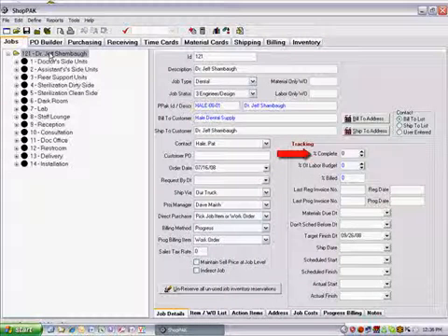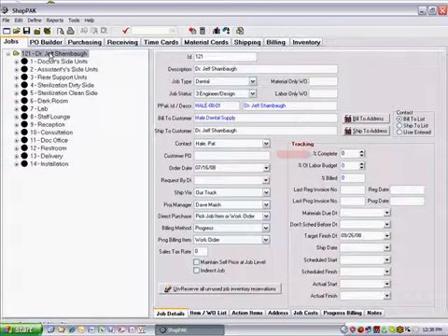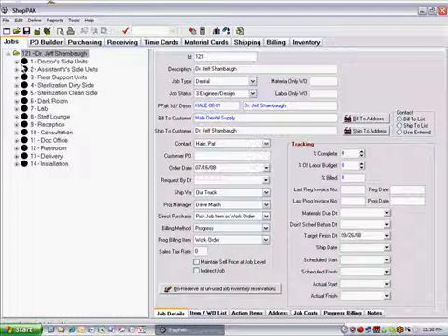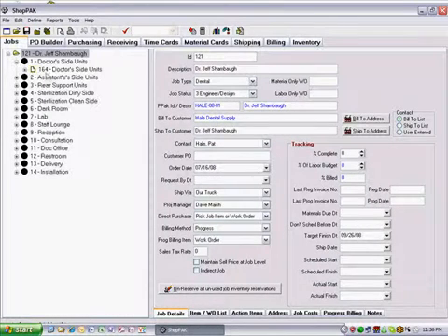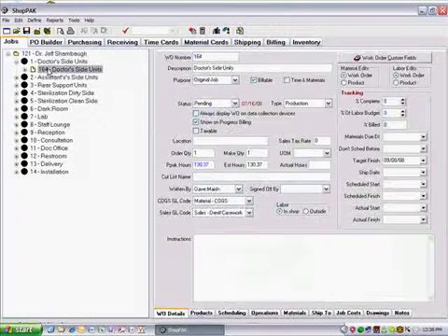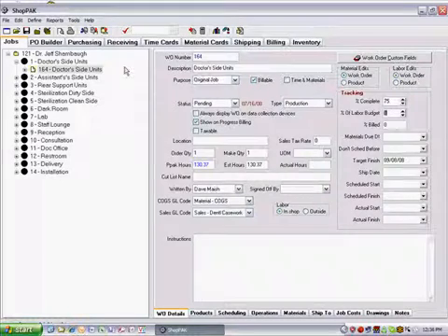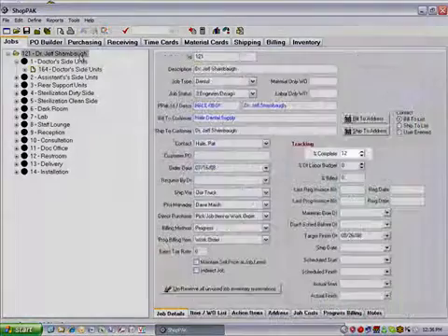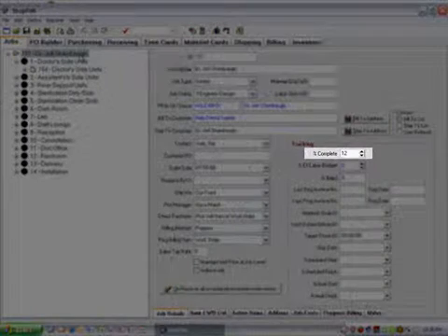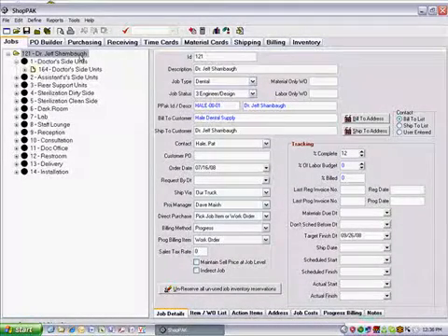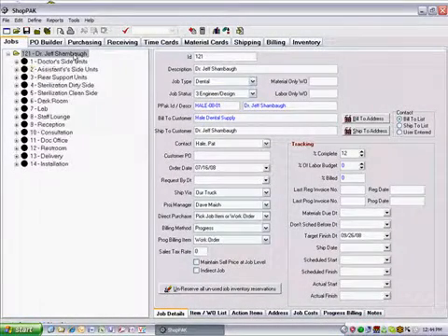You can update % complete at the job level. However, it is usually more accurate to maintain % complete at a lower level in the job tree, let's say at the job item or work order level. And provided you've set up % complete maintenance at the same level, ShopPAK bubbles up the lower level's % complete and calculates % complete at the job level. For more information on all fields and controls, please refer to Chapter 6 of the ShopPAK User's Guide.